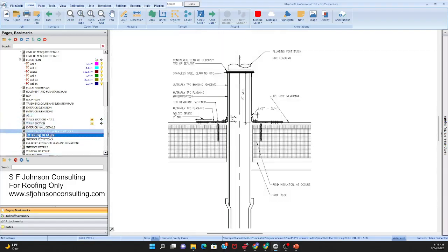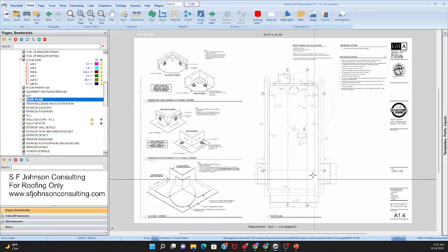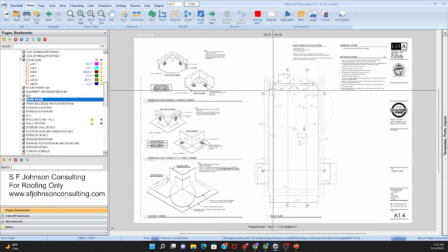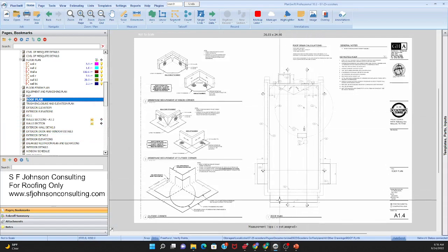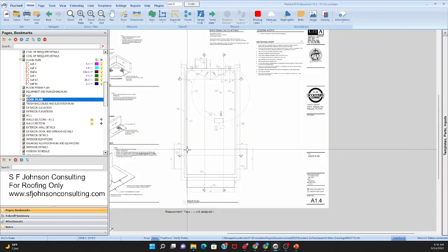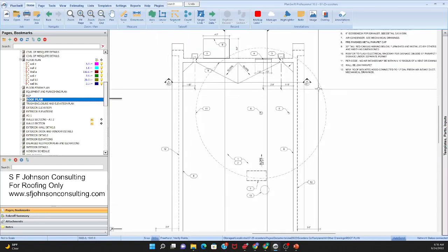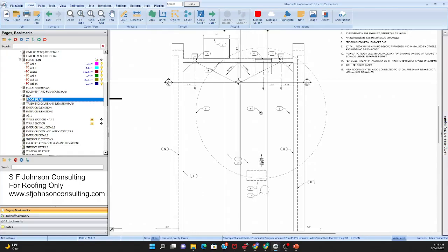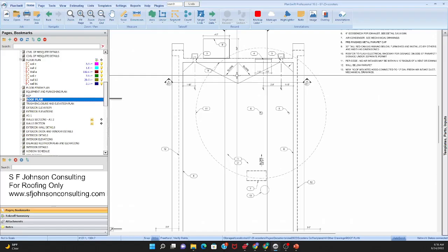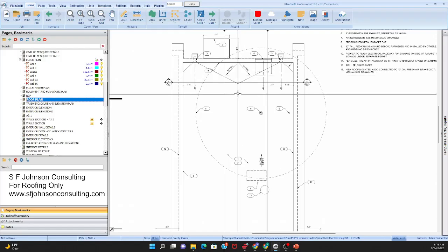All right, so roofer, you are going to make sure you know how many square feet flat, how many additional square feet for your parapet wall, parapet cap, all the goodies that go with that, and know the heights. That's why they give you the section views, because the section view marker is if what? This is, we cut down in 2, and now we're opening up and we're standing in here and we're looking at the interior construction so you can have a better view. And then that view will take you to a detail view most likely.